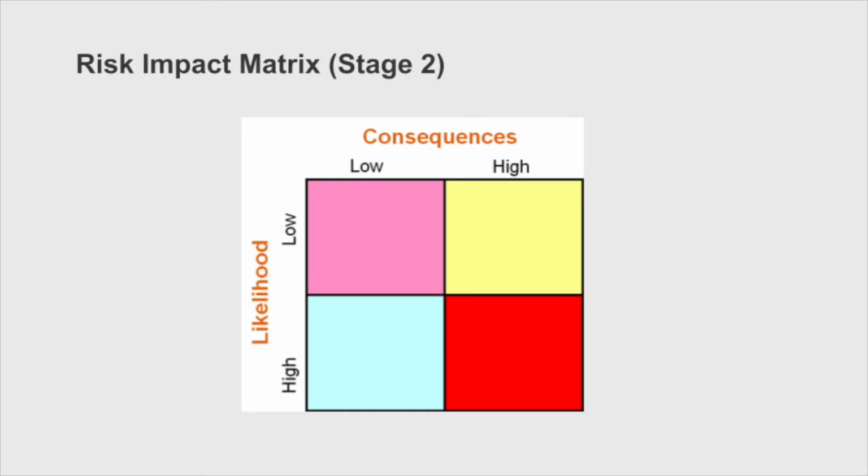We also need to evaluate each one of the suggested problems that could come up, some of the potential risks, and evaluate or weight their potential consequence on the success of the project. Meaning that if, for example, there were a fire that would destroy everything, the consequences of a fire could be devastating. So very high consequences to a fire.